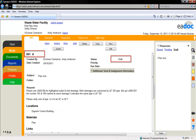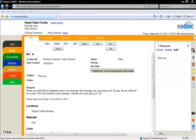You can see that this RFI is in draft form and has not been assigned an official RFI number yet. As long as your RFI is in draft form, it can be edited or deleted.